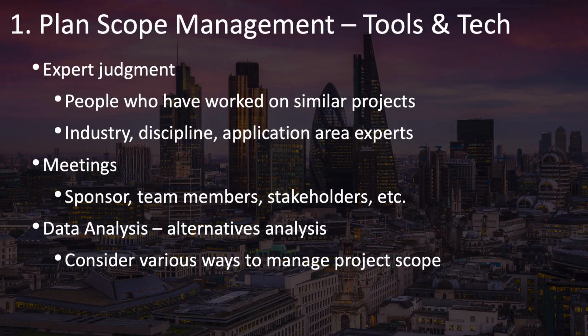Developing the scope management plan should include many different stakeholders, including your sponsor, your team members, other stakeholders, anyone who has any responsibility for how scope can or should be managed. These meetings can be workshops or interviews or any kind of meeting that helps you to gather this information and get their input. Data analysis involves mostly what is known as alternatives analysis.